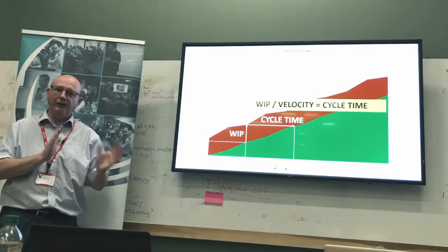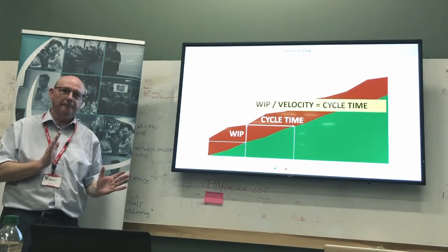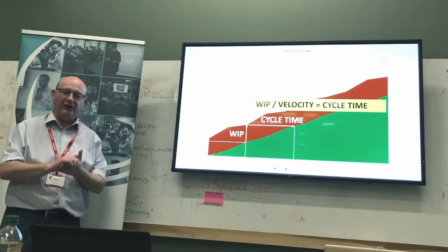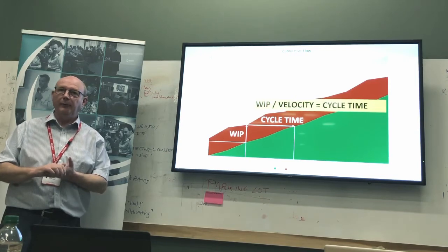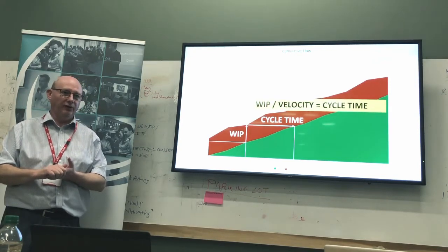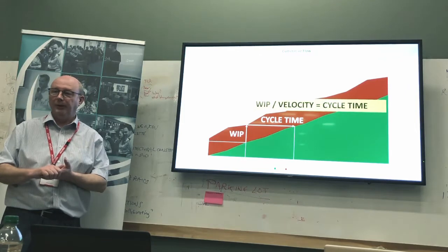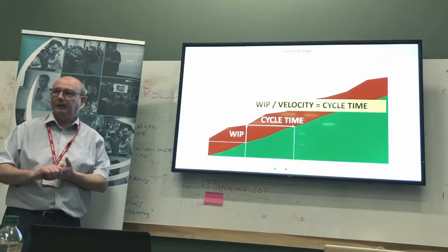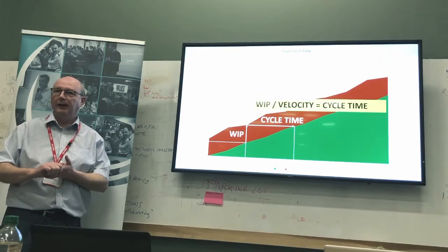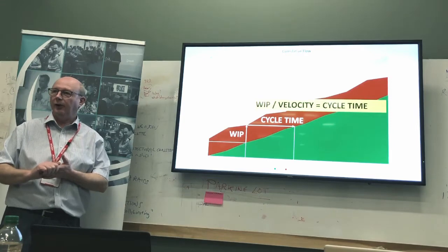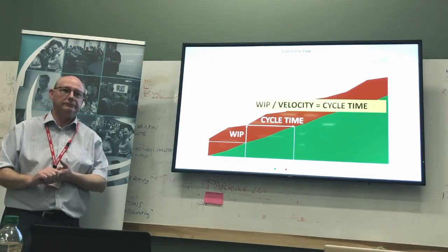And done and delivery are not necessarily the same thing. Quite often what we do is we set our tickets to done when they're ready to be delivered, and then we deliver at the next opportunity. Maybe we're making up a big release of stuff. Not all of us are able to release every story as we get it done. When I worked at Travis, we had a release cadence. You had to get your stuff all signed up by Thursday lunchtime, and then it all got released on Monday morning. Every Monday morning.